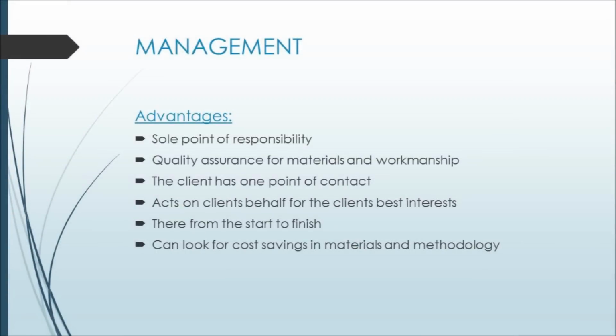Now for some advantages for the management procurement system. There is a sole point of responsibility on the project manager. He checks the quality assurance for materials and workmanship using his experience and knowledge. He knows what the industry best practice is. Also, there is one point of contact for the client, architect and engineer, which makes things easier on site. When dealing with subcontractors and making decisions, he acts in the client's best interests, because that's who's paying him. The project manager is involved from the start to the finish, so he's familiar with the site, and he can look for cost savings in materials and methodology because of his previous experience, and he is not motivated by money, as he is getting paid no matter what.